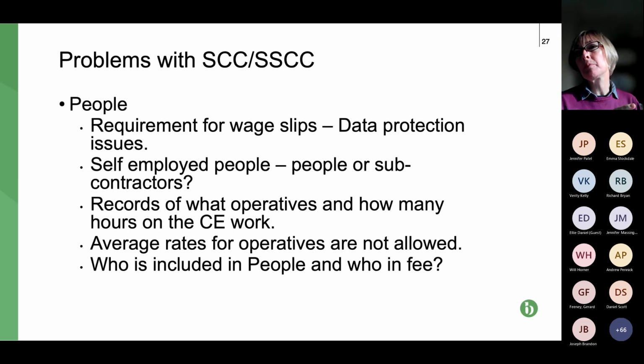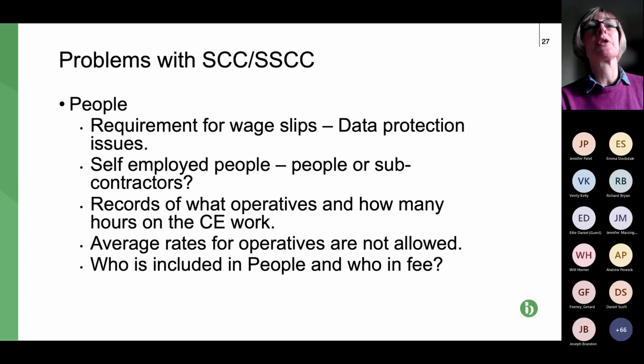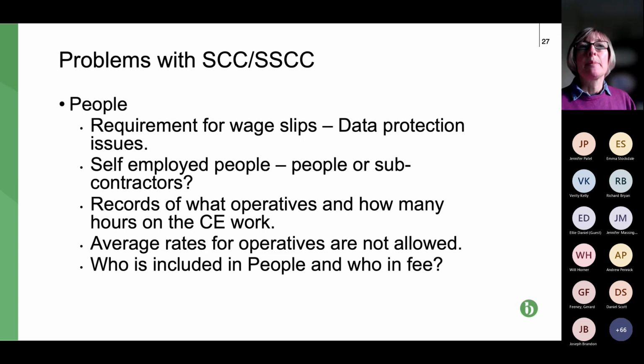That includes CE work, but also general work if you're carrying it out under options C, D, and E, because you need to show that, well, we spent 3 hours doing whatever task it was, whether it was CE work or not, and that's a reasonable period to spend on work of that type. Next slide, please.